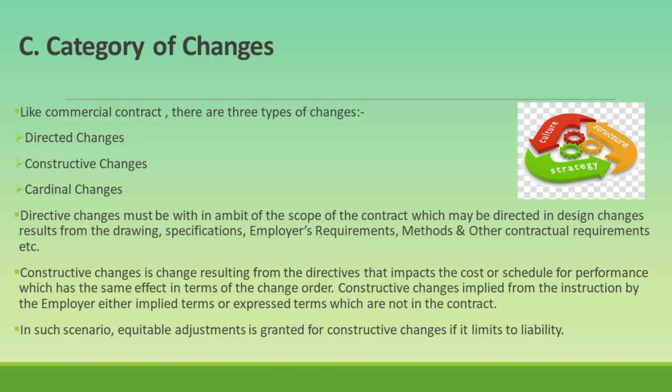In such scenarios, the contractor is entitled to equitable adjustments to address the additional costs or delays incurred. Cardinal changes refer to significant modifications that are outside the original scope of the contract. These changes are so substantial that they essentially create a new contract, and can lead to major adjustments in the project's scope, cost, and schedule. It's important to handle these carefully, as they might require renegotiation of the contract terms or even the formation of a new agreement.